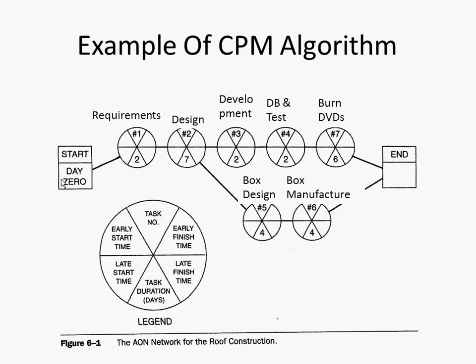But ladies and gentlemen, the key thing here, if there's one concept I want you to take away from this lecture, it's this. This is what's called the critical path of your project. It's called the critical path because we have no give, no leeway, no float, no flexibility. These are the set of tasks in the project, this upper path, where if we don't hit each one and keep on the ball with each one, we're going to be delaying the whole project.